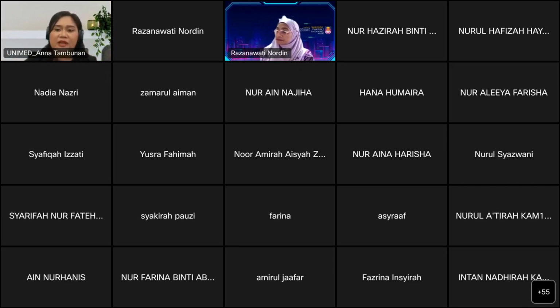You can divide it, for example: first page executive summary, and then the following page project background, then project vision and success criteria, then potential risks and mitigation strategies, then project scope and deliverables, and then SMART goals, project approach, expected benefits, project resource requirements, project cost and budget, and the last one, project timeline.